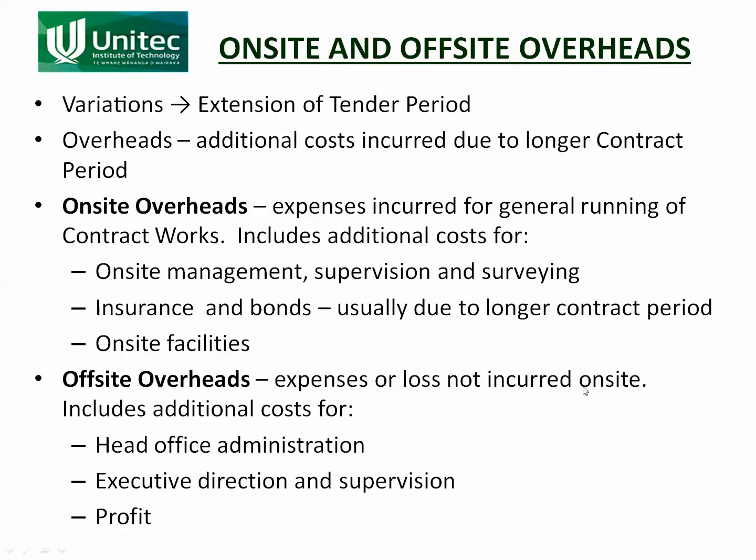Off-site overheads are not incurred on site, so that would be the administration person doing the timesheets for an extra period of time, the director if he's having to keep an eye on the works, and profit. If it ran over for about a week, then that's a week where those workers aren't working on another job, making more profit for their company.